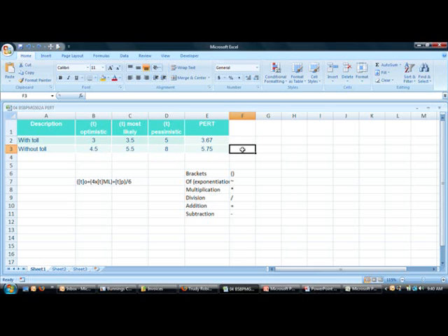Looking at this scenario, any tasks that have a greater variance between the most likely and the pessimistic are the ones that you would usually need to undertake a risk analysis on, to ensure that that particular task was managed in a manner that brought it into line with the more likely or the PERT analysis, so the pessimistic view was the least likely to occur.